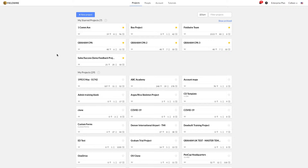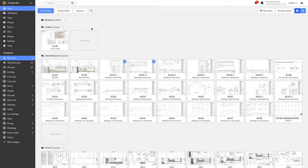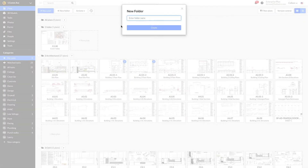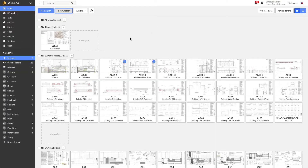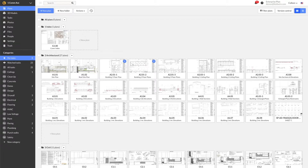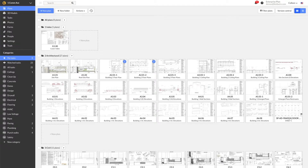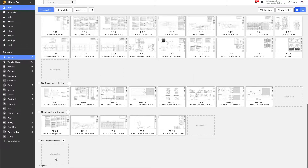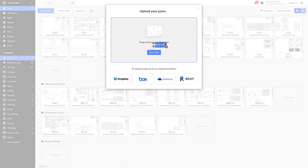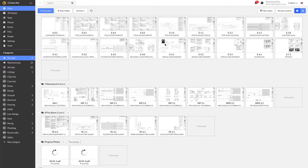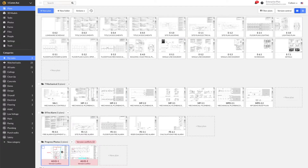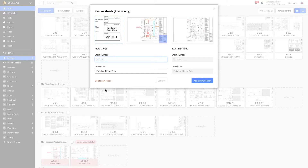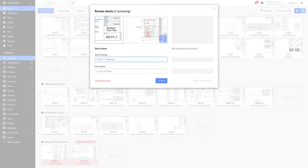Let's jump into the desktop version to set up my project for great progress photo tracking. I'll come to my plans tab and create a new folder — let's call it Progress Photos. Next, I'll upload the latest version of each of my floor plans. You won't need to keep these updated as long as the general layout of the floor plan remains the same and your team knows not to build off of this particular floor plan, since this plan is primarily just to show progress. I'll drag and drop my file into Fieldwire and wait for it to process. Because this floor plan has been uploaded before, Fieldwire is prompting me to slip sheet it. I want to keep this copy separate from the other versions, so I'm going to add to the name — let's add dash Progress Photos.